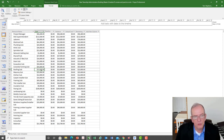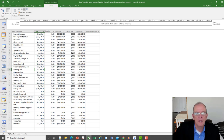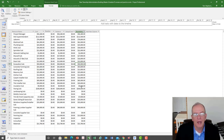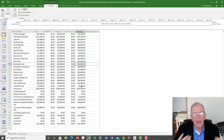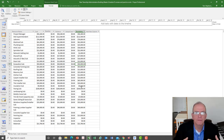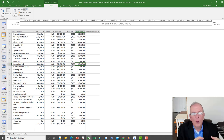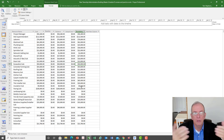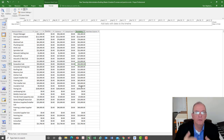Once I set this as my baseline, when things change the software will show variances and how much money has been incurred in work performed versus how much is left to pay out. From a cash flow perspective, you're really looking at: when does the work get performed, how much does it cost, when do I have to pay it out, and how does that match up against my schedule of values with the client? A construction company must think about this across all projects, not just one, since they could have a cash crunch where money going out across profitable projects exceeds available liquidity.